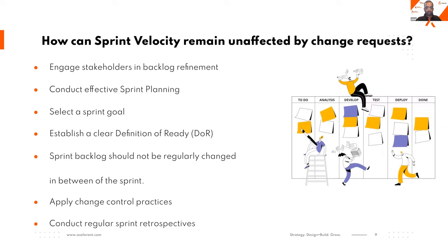But we know that everything we plan is not going to happen that way. We'll talk more about sprint retrospectives and how Agile antipatterns impact them, but I am talking a bit about it here as well. If any of our plans are not working, and you have a chance to talk about the problems and failures in the sprint retro, you can immediately fix it before the upcoming sprint. If you don't do that, the team will start nurturing the habit of following some norm, which is actually the Agile antipattern. So you can detect all your Agile antipatterns via sprint retrospective meetings, and doing it on time will help you fix them on time.